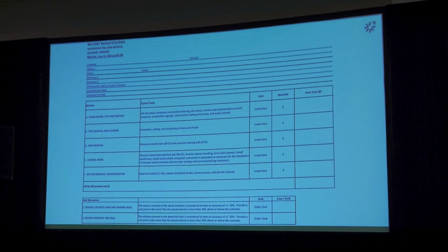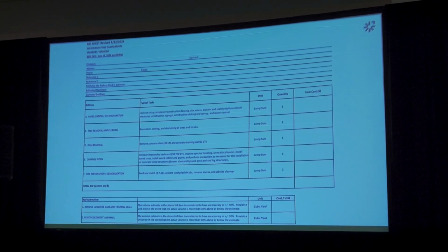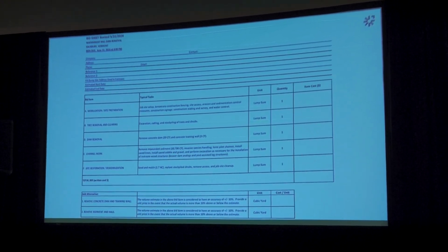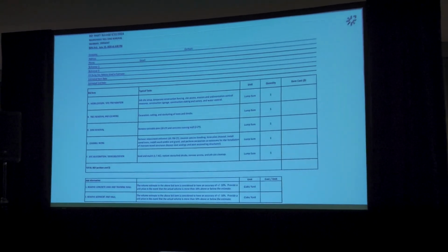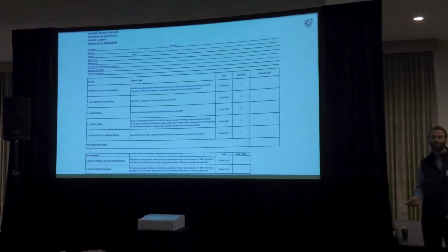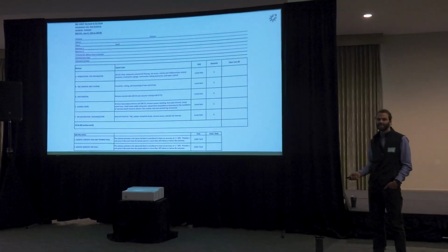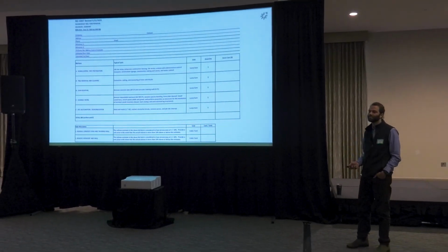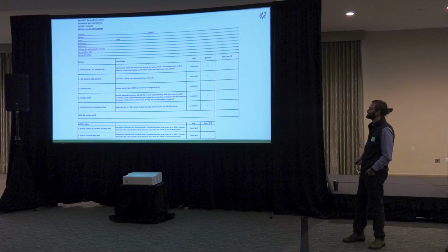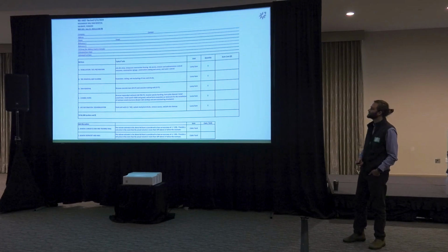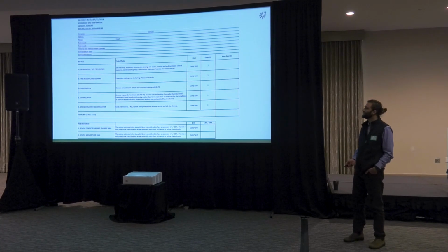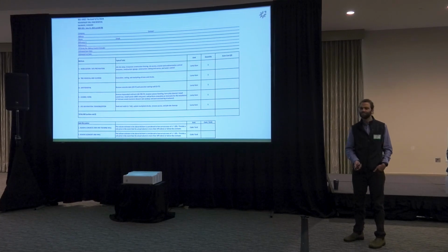Another important one we have there is the fill dump site. Sometimes on projects we have a fill site already identified, sometimes we don't. Either way, the contractor can either use the one identified or propose another, but we want to make sure that we understand what their bid includes. And then construction schedule and a price for each of the bid items that we have listed here.